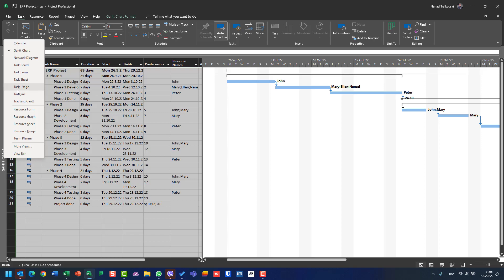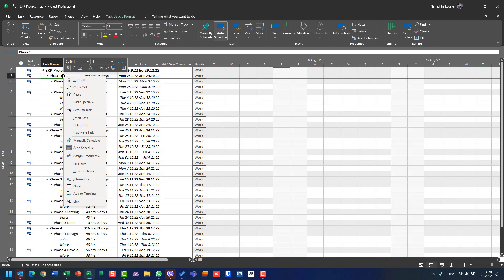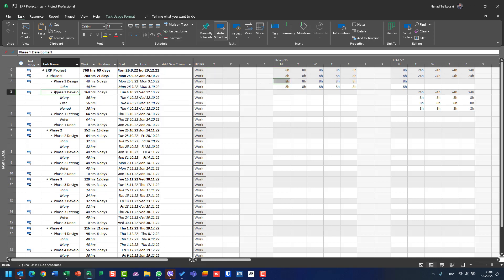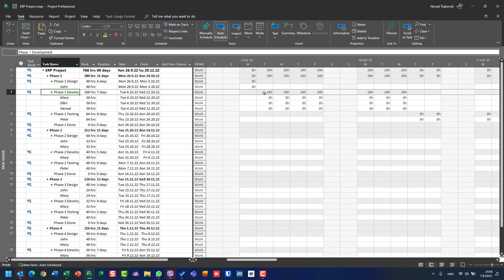Task Usage view will show me different information — a different view for the same information which is the Entry table. I have no Gantt bars here. I see hours which are supposed to be worked for a task. Phase One Development is supposed to have 24 hours on Tuesday, Wednesday, Thursday, and Friday — eight hours for Mary, eight hours for Ellen, eight hours for Nanette.